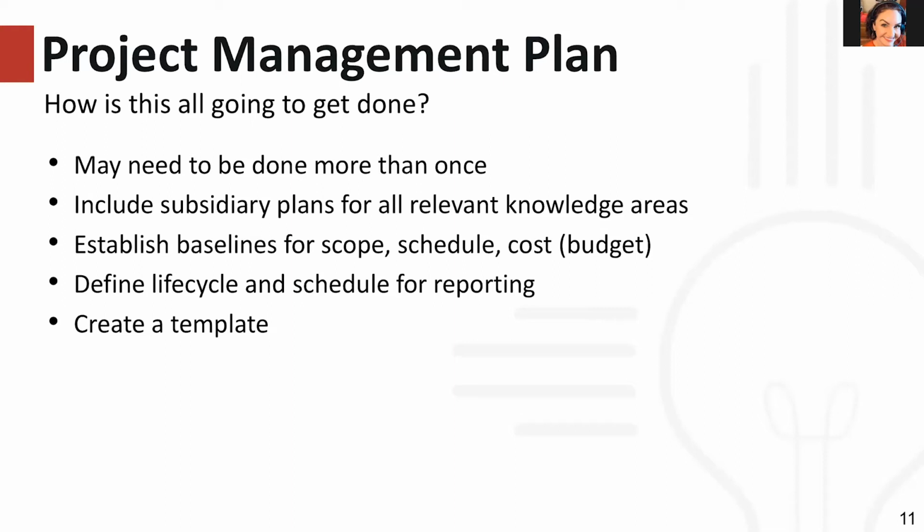The really nice thing about us is that in our work, we often don't have to recreate the wheel every time, and we can and we should use university and departmental policies and procedures to create a framework that'll work for most of our projects. So depending on the size and the complexity of your project, a thorough project management plan will include subsidiary plans for each of the relevant knowledge areas. As a reminder, that's the things we just talked about, like communications and resources and procurement.